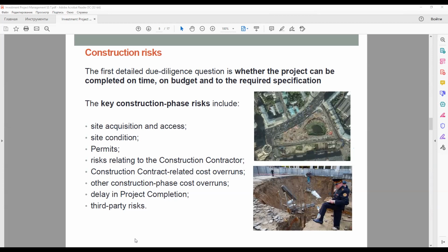And the permits: lenders generally require construction permits to be obtained before any funds are advanced, to ensure that failure to obtain such permits does not delay project completion. If for a good reason such permits cannot be obtained at this stage, a specific timetable for obtaining them is normally established with lenders. Where possible, lenders prefer the risk of obtaining these later permits to be placed on the construction contractor, who thus becomes responsible for any delay caused by a failure to obtain them.